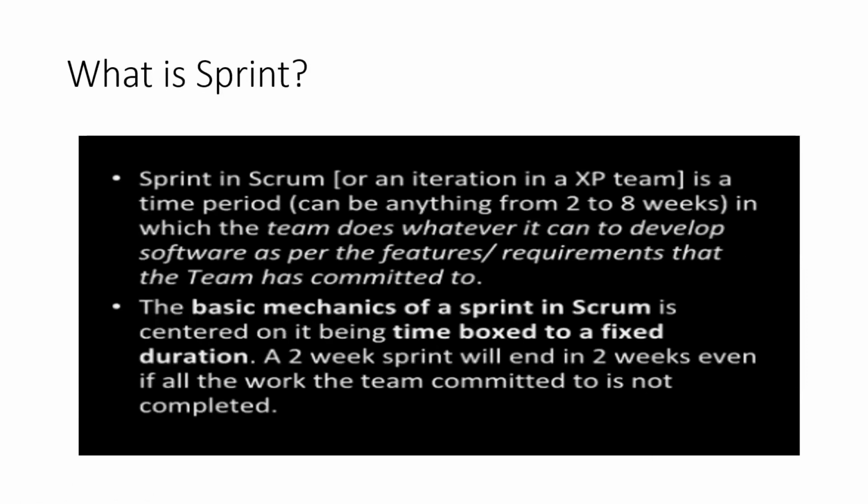So the sprint, what I have just explained to you, is nothing but a time box event. We call it a smaller time box of 1 week or 2 weeks, depending on the company and the project, how they have selected. During this time box event, the team will work very effectively. They'll be very much focused, and they will work as a team to complete or achieve the goal they have set for a particular sprint.